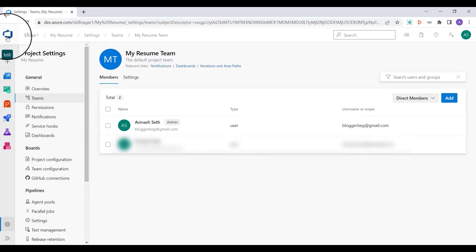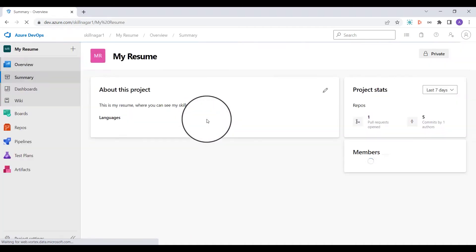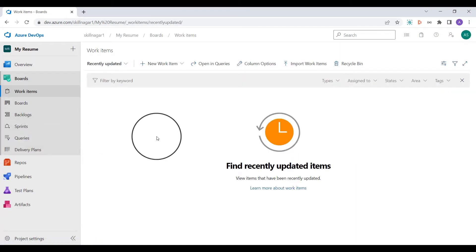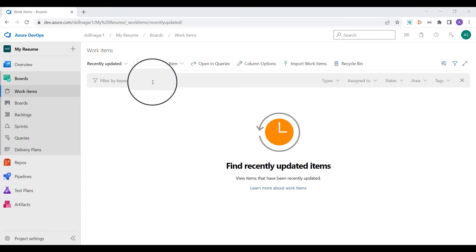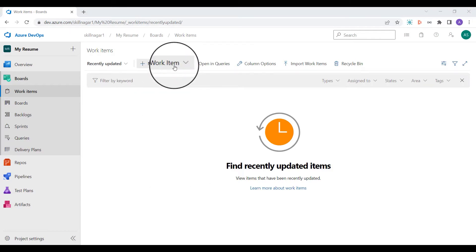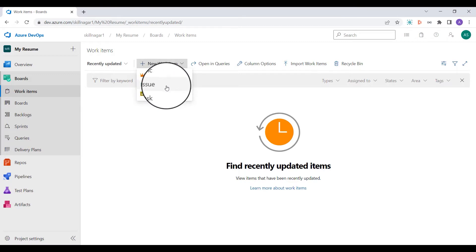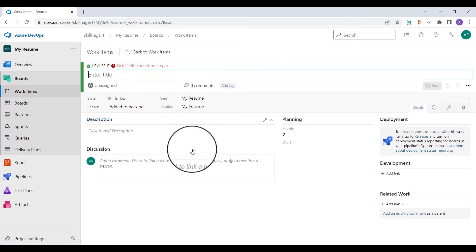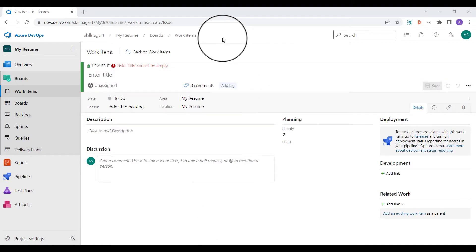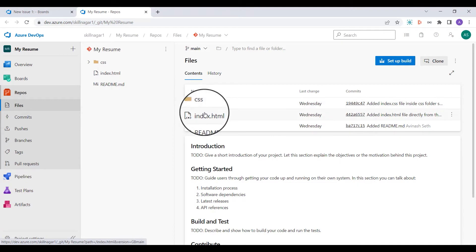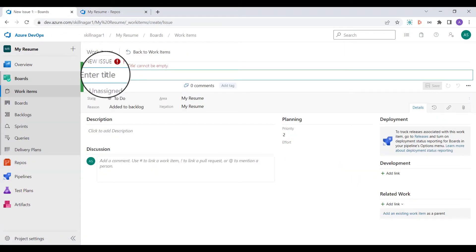I'll come back here and click on my project name. I'll click on the board section — this is basically a project management toolkit with which we manage a lot of things. I'm going to click on new work item. I can see various options: is it a task, an issue, or an epic? To keep things simple, I'll click on issue. For this project I'll say 'add about.html page' as the title of my issue.